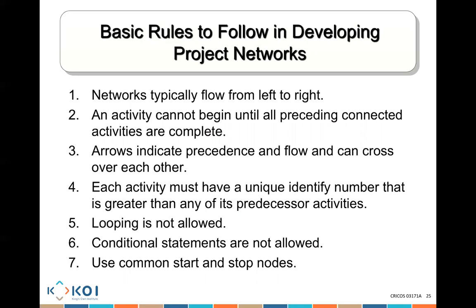Looping is not allowed. If there's activity A, B, C, D, E, you can't do D and then go back to do A. There's no looping. You start it, then you do the next activity. You can't do conditional statements like, if B does that, then I'm going to make A again. No, you do A, you finish it, you move on. You can't say, if this happens, I'm going to do something else. That's not what you do in the project.